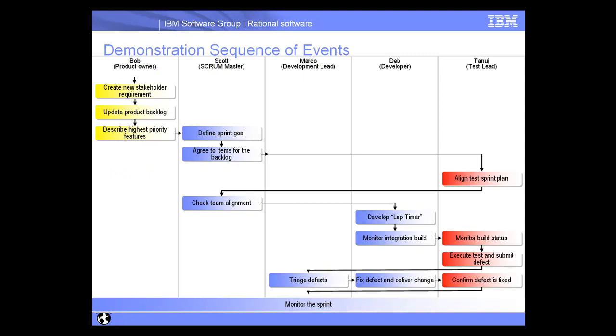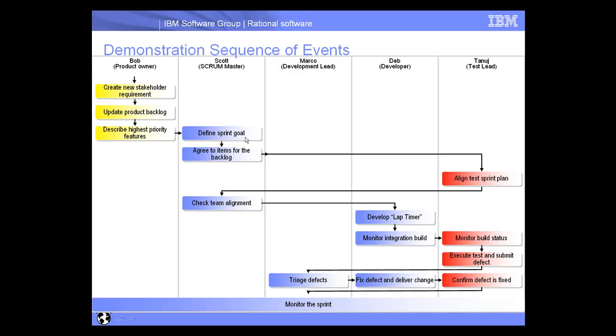Here we can see an overall sequence of events that occur throughout the demonstration, shown by different swim lanes here to represent the different team members, as well as the activities that they perform. For example, we'll start here with Bob. The first thing he's going to do is create a new stakeholder requirement. He'll do this using Rational Doors. He'll then update the product backlog and describe the highest priority features using Rational Team Concert. Once that's completed, Scott will then define the sprint goal.